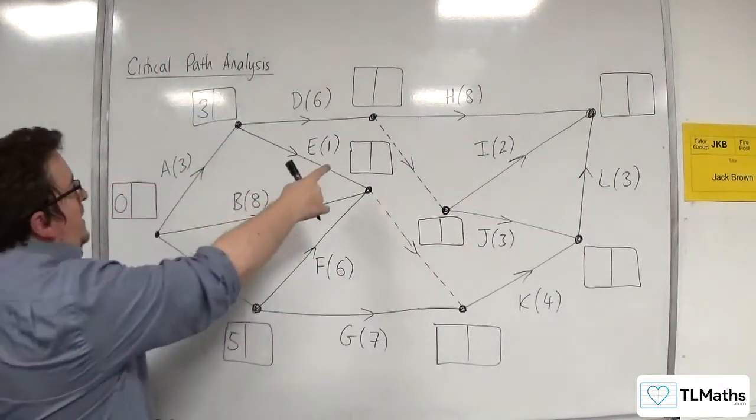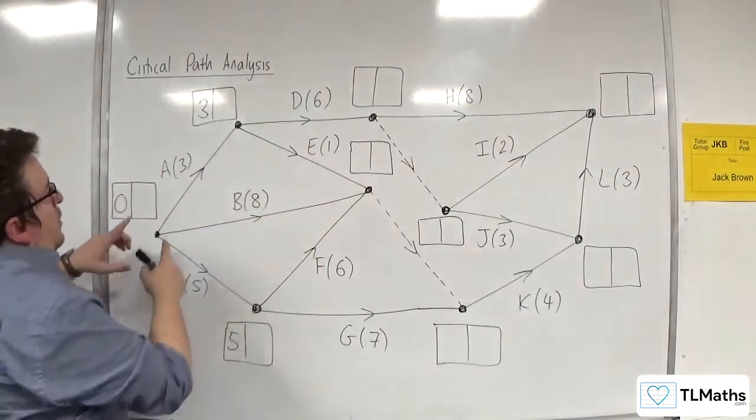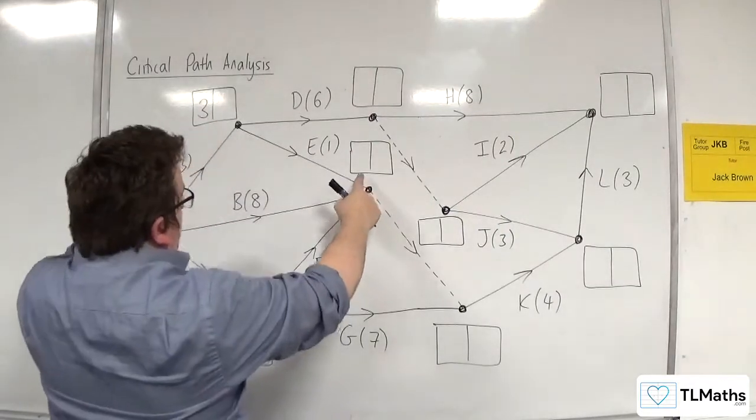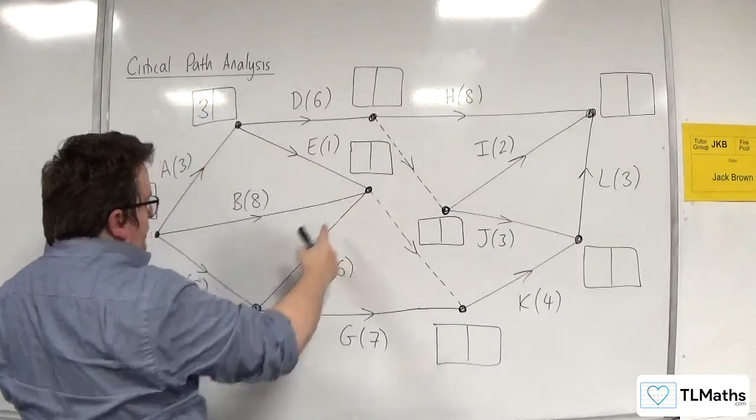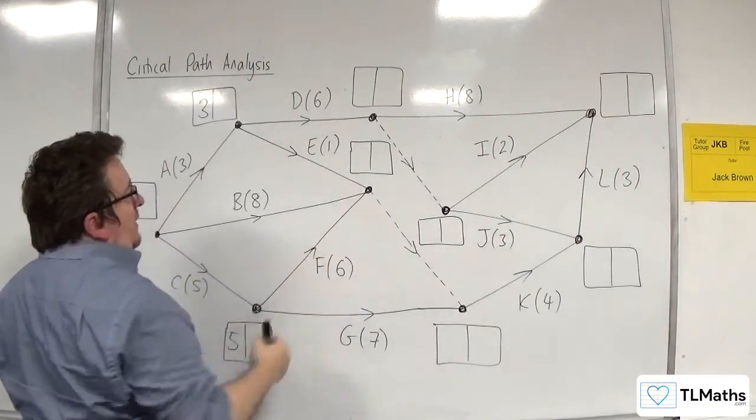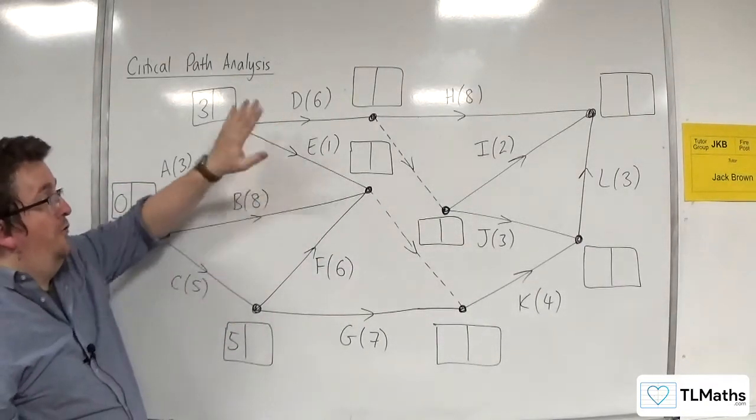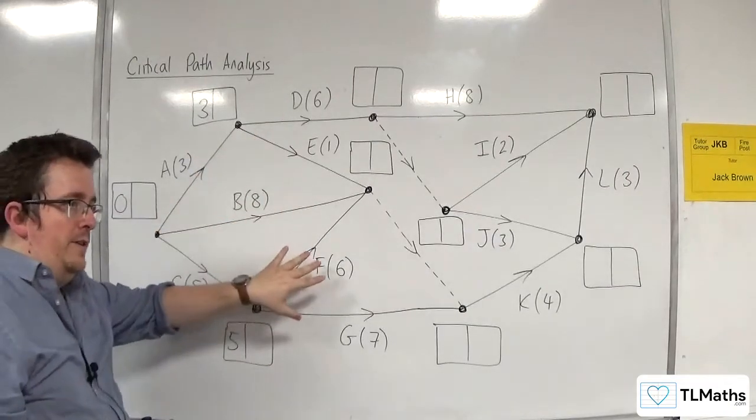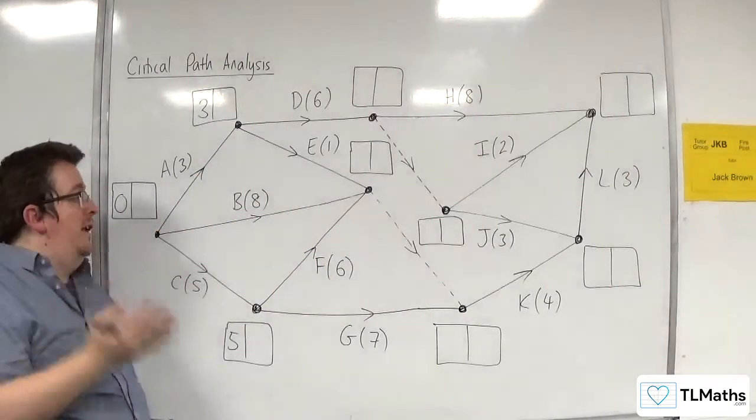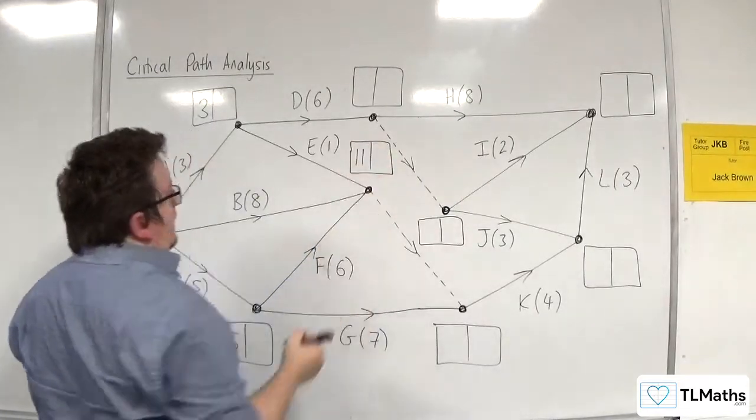Right, now we can do this one. So we've got 3 plus 1 is 4, or 8, or 5 plus 6 is 11. So 4 or 8, or 11. So you need to go for the largest of those, so that would be 11 in there.